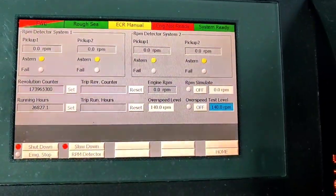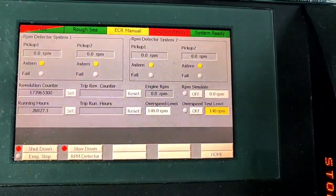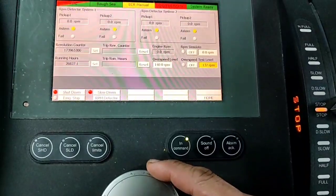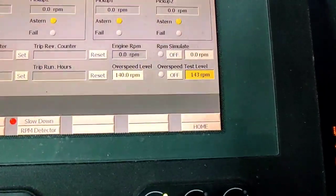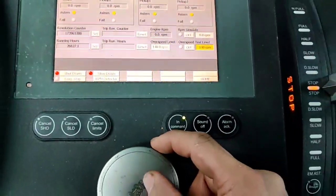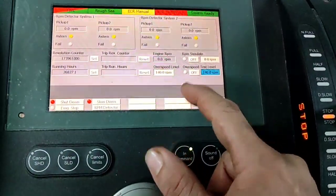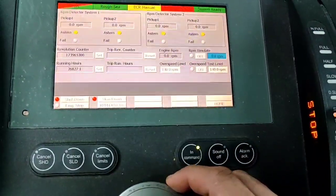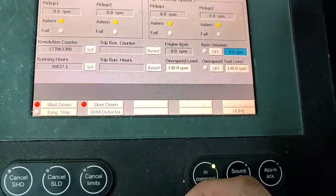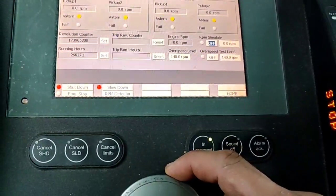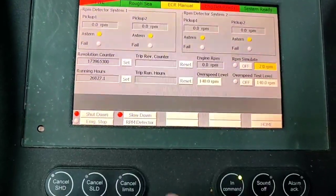This is the first procedure I want to test. The other procedure is to disconnect the contacts for the signal going to the RMS — the over speed signal. But this simulation method is very nice because you can simulate RPM: if the set point is 140, you can even simulate 144.